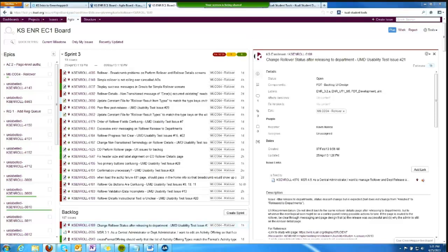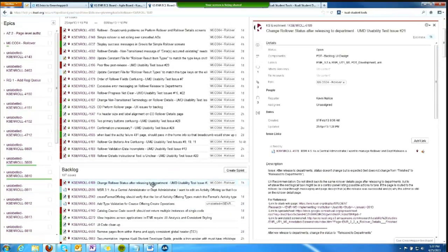And if I'm looking at the questions, if we remove a Jira from a sprint, does it move to the product backlog? Yep, it moved right back to the backlog here, and it moved it to the beginning of the backlog. I don't think it's going to remember that it was at the top of the backlog before you pulled it into the sprint. So work that gets removed from the sprint probably needs to be reprioritized as necessary in the backlog.